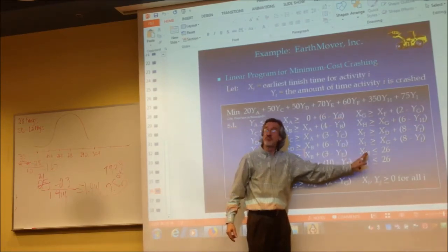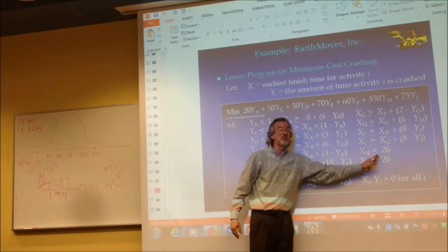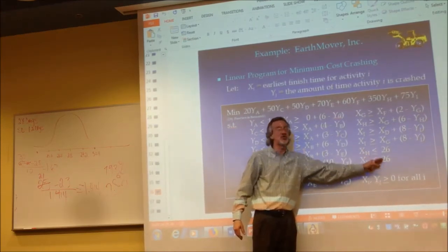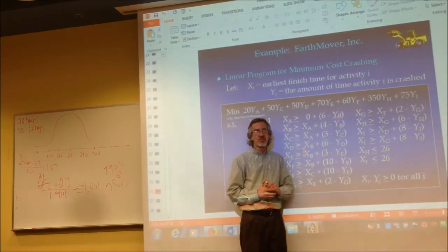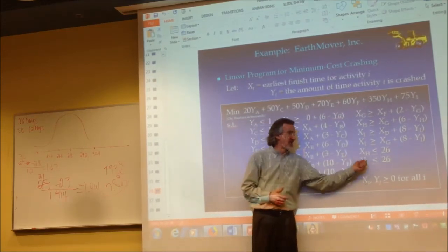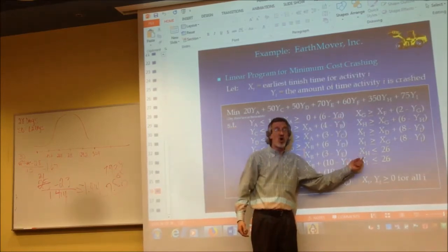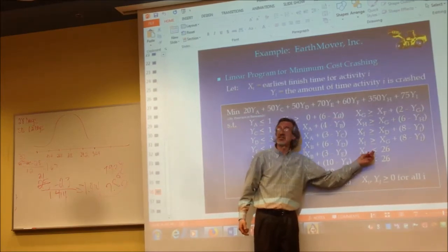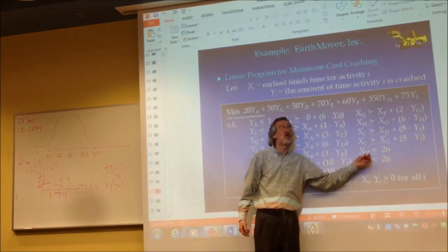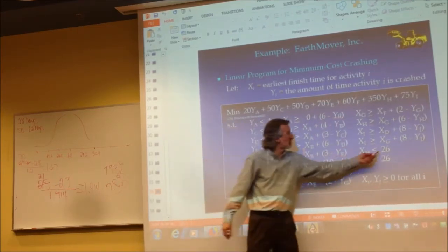And you will always put these activities that do not precede any other less than or equal to whatever amount of time you're trying to crash this down to. Let me say that again. The activities that do not precede any other activities are always set up so that their x variables are less than or equal to whatever number of units of time you're trying to crash this project to. So I can see this is being crashed at 26.